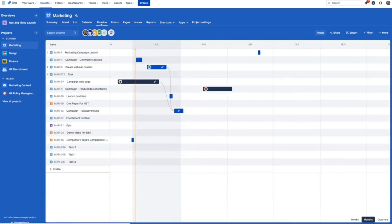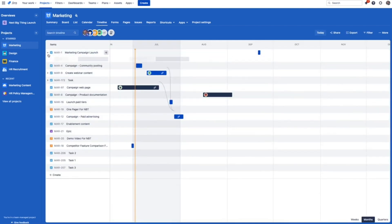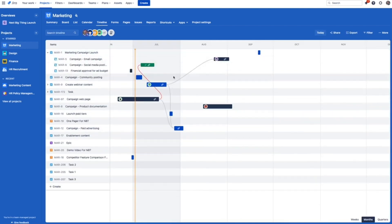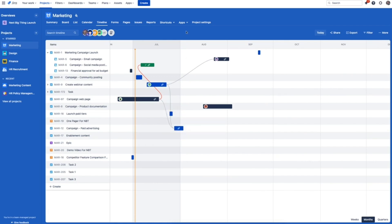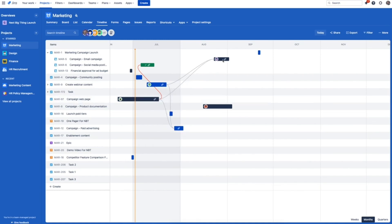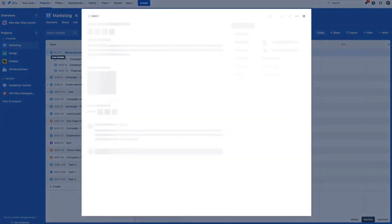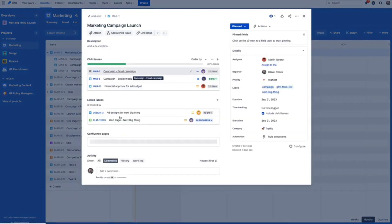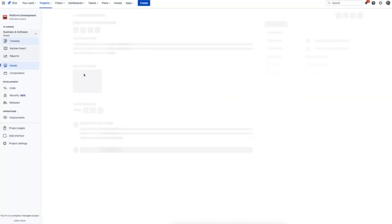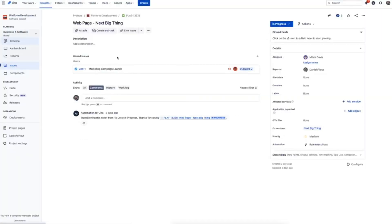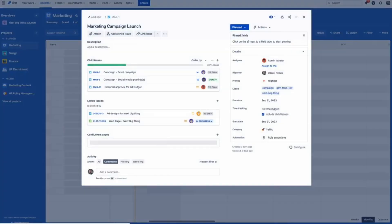Timeline view helps you really quickly understand the start and end dates of all your work and the dependencies that exist between them. Here we can see there's a dependency between these two tasks. The landing page is blocking the launch of our advertising campaign, which means it has to be completed first. With a timeline you can easily create dependencies between tasks within the same project like this, or you can also create dependencies across other projects, even those in Jira software. Click into a task and you can see the dependencies not just within the project but in Jira software too.